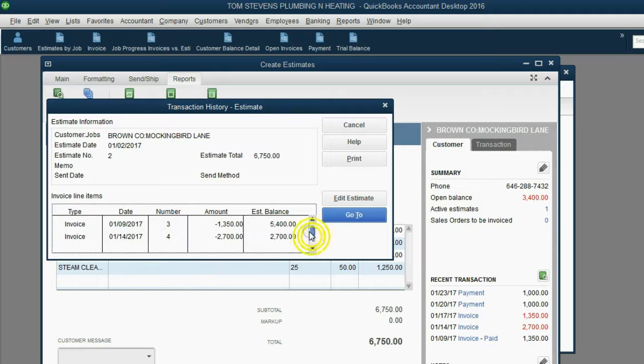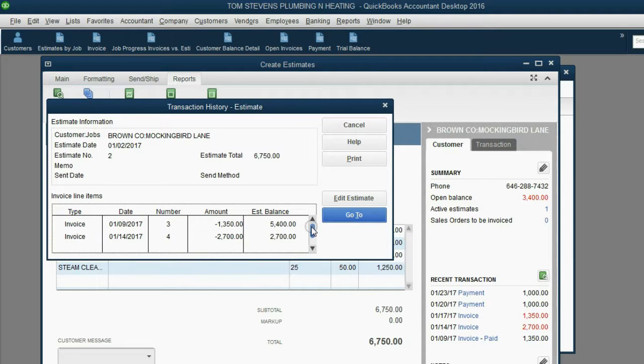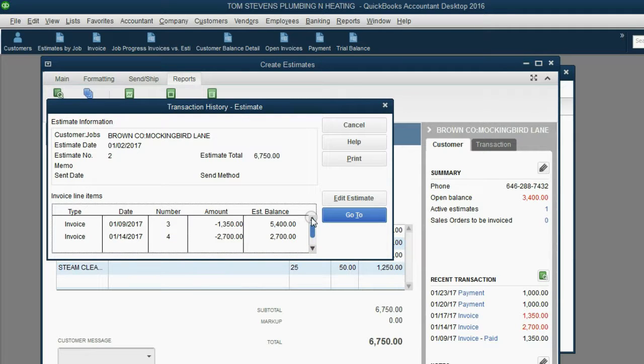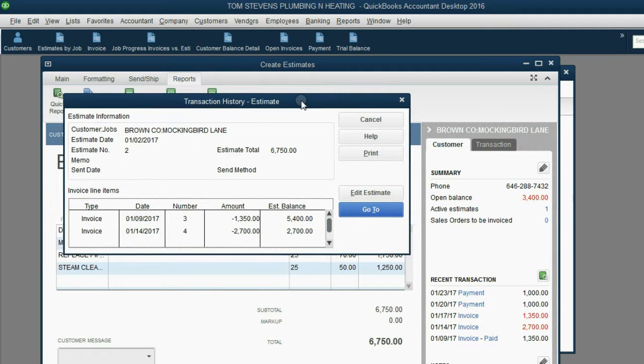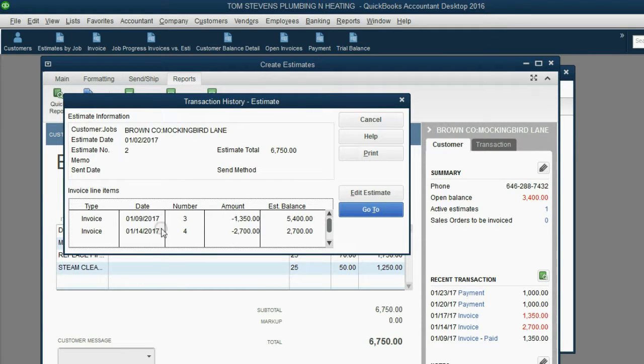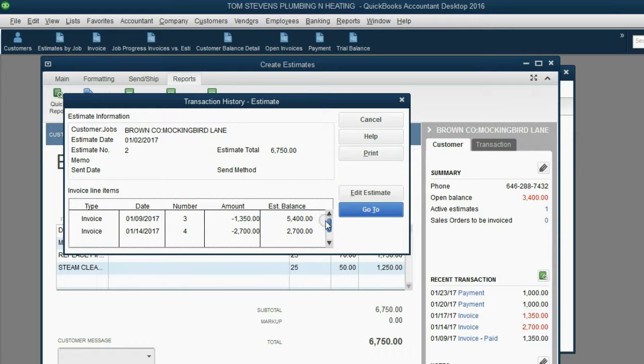Unfortunately, you do have to scroll up and down to make sure that you found every invoice applied to this estimate. What's good about this window is it shows the running balance of the estimate at a particular moment in time. Unfortunately, it will not consider the change orders. It will only consider the invoices.